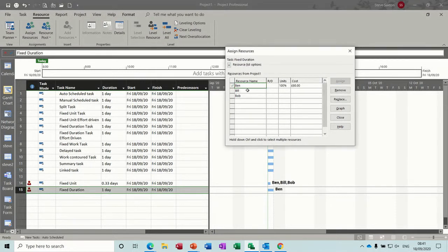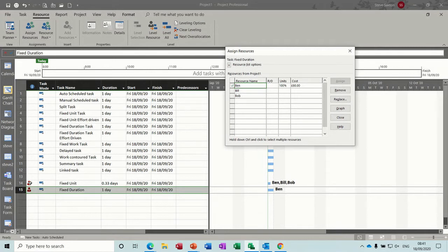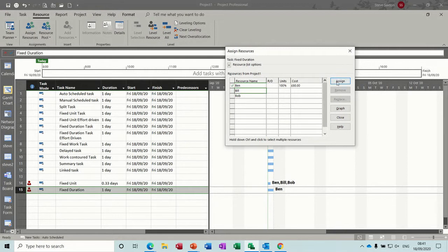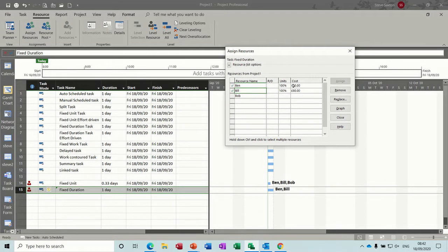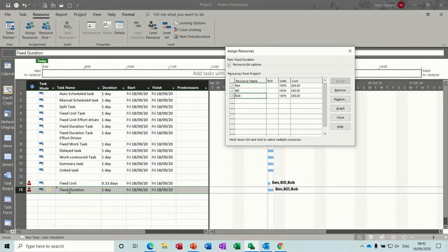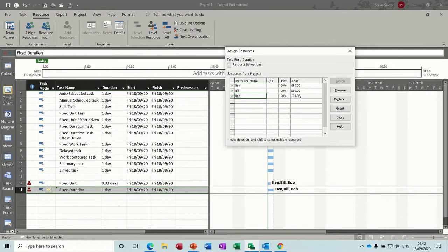So I've assigned Ben, nothing's happened to the duration, don't worry about the over allocation there. I'll assign Bill, nothing's happened to the duration, as it should not, and nothing's happened to these, they're both getting full pay, as is Bob. So this could be like a training event, it's a one day fixed duration, no matter how many people turn up, it's still one day and everybody's getting paid.